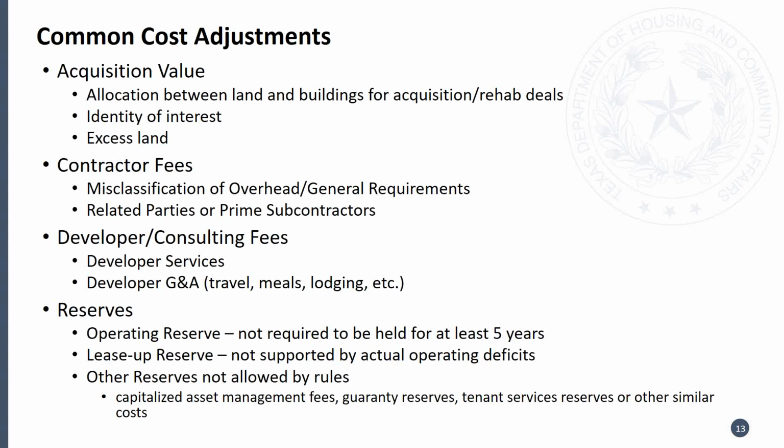Related parties of prime. I'm sorry, this is Dan. Could I add to that the contractor fees, make certain that they're also looking at the change orders, because that's where I see a lot of those fees missed. Yeah, so definitely. So in addition to the G702, G703, if there are change orders, we will ask for a copy of the change orders and then identify that there were, in fact, contractor fees within the change orders that were not included or classified as such in the cost schedule. So that could put the deal over on the contractor fee requirement that the owner may not have been considering.